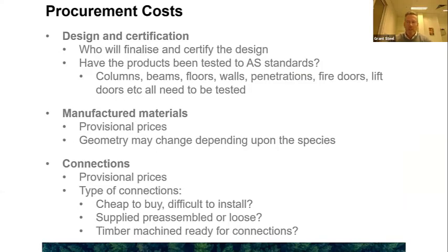Starting with design and certification, probably establish who's going to be responsible for finalizing the design of the structure, and will it be a requirement of the manufacturer to assist in this? I would encourage you to see what certifications and test data each manufacturer has to support this. And it's critical to see if these manufacturers have certifications to acknowledge the local standards.